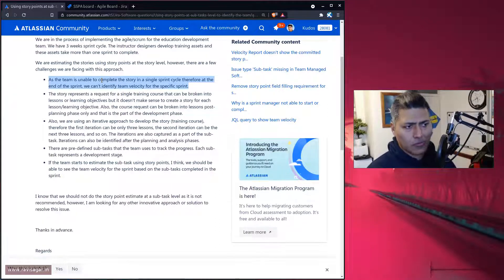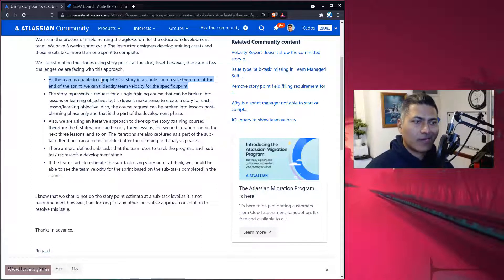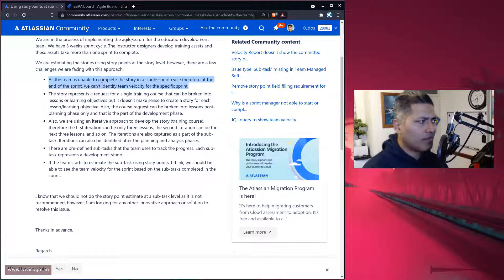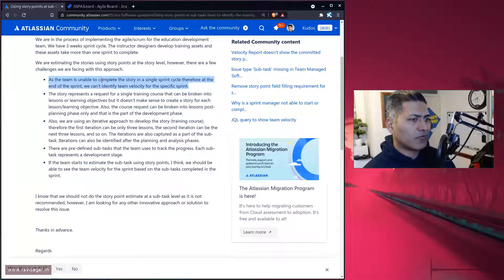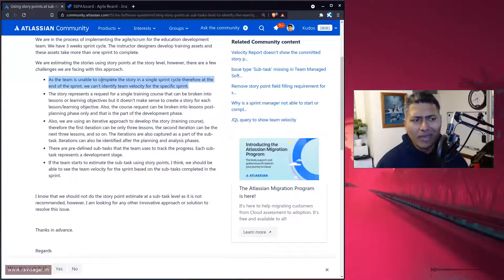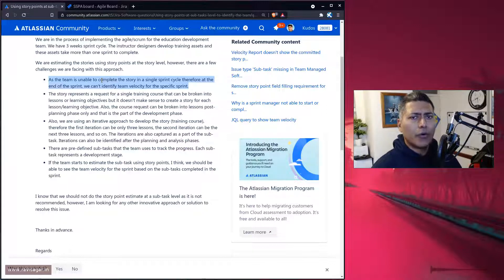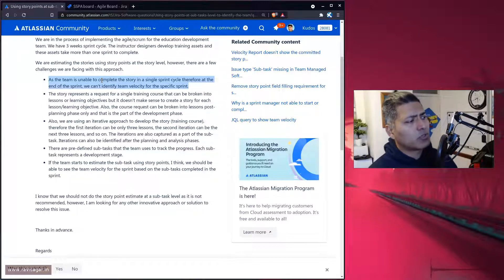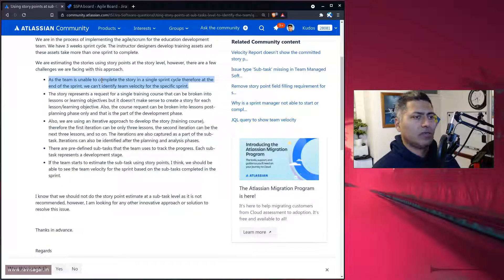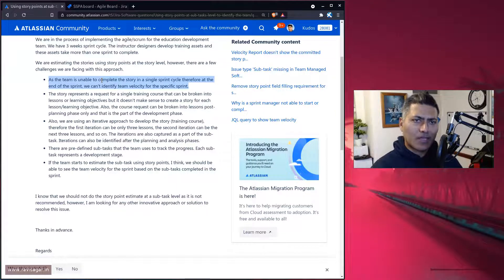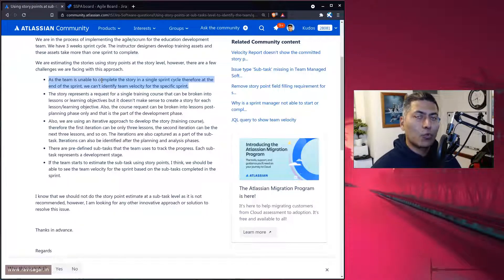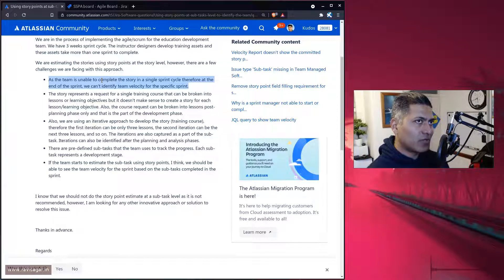The first thought that comes to mind is: why not break stories further? I still recommend taking a look at those stories. If you're not able to finish them consistently in one sprint — whether your sprint duration is two or three weeks — it means your stories are probably too big. A simple solution could be to use epics, which is a large story or combination of multiple stories.